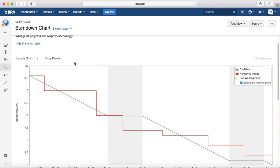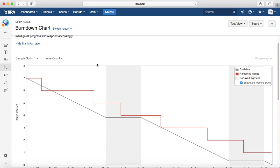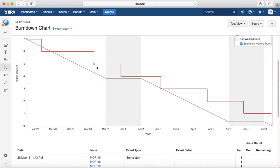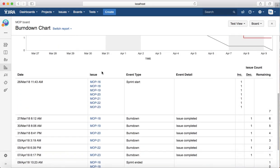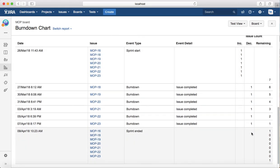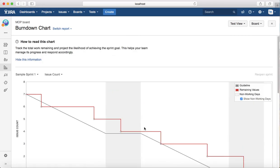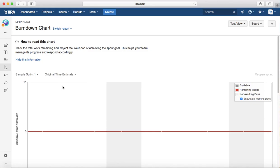That's how you track burndown chart based on story points. Similarly, you can do it for the issue count, how the issue count is reducing in that particular sprint. These are the issues that you have planned and how the issues have been reduced on what particular day, which issue has been resolved.